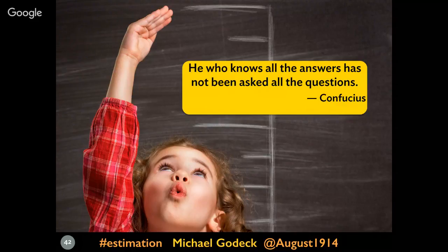And the important point, relative to what you're saying, is that the less you know about something, the less information you need in order to move your uncertainty needle. Now, you're talking about people that know a lot about what they're dealing with, and they're trying to improve their accuracy by small percentages where they have a lot at stake. But if you're looking at something where you have absolutely no idea what's going on, you need very little information. Maybe one observation is enough to move your uncertainty needle. You could have 5 observations, and that could be all the information you need to commit to a decision, that variable within the context of your decision.